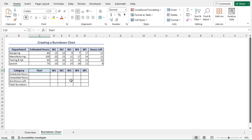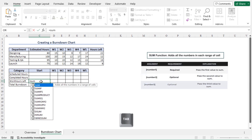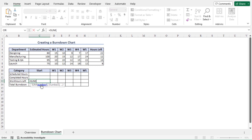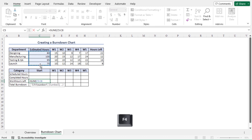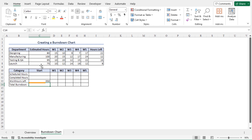To calculate the total work hours left at the beginning of the project, go to cell C13, type equal, type SUM, press Tab to autocomplete, then select cells C5 to C8 — that includes all the estimated hours — and press F4 to lock the cell reference. Close the parenthesis and hit Enter. This returns 350, which is the total work hours left at the beginning of the project, meaning the total work hours of all departments should equal 350 to accomplish the project.